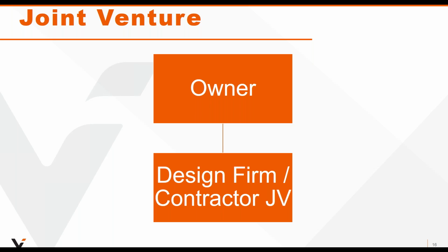When you're in a joint venture, you also have a fiduciary responsibility to your partner, which means that you have to oftentimes look out for their interests. So that goes beyond the typical arm's length commercial relationship that you have with a partner or with a prime or a sub. So that opens up another set of responsibilities that you need to be aware of. Again, your joint venture agreement, oftentimes, you do require sophisticated legal counsel to review these.